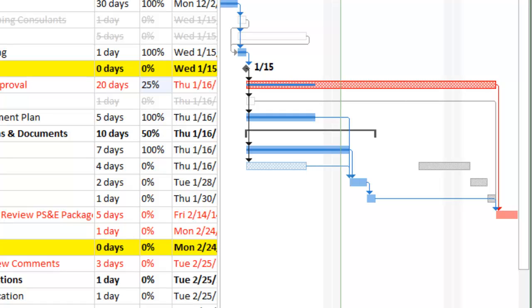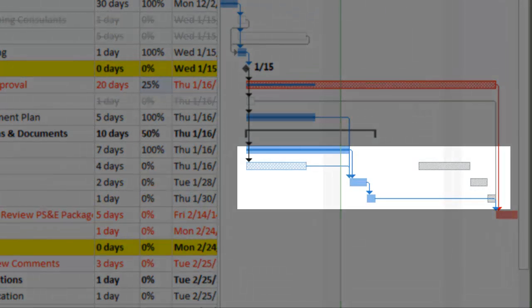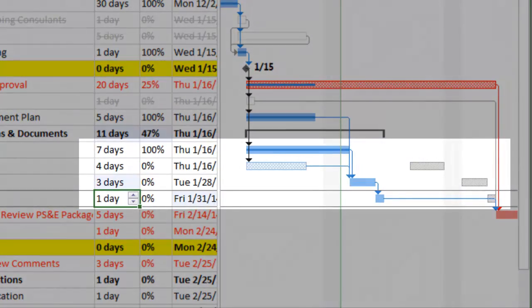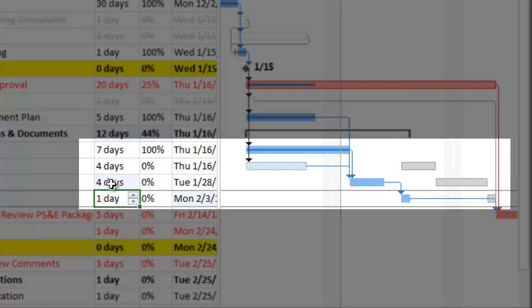It allows the project manager to quickly visualize activity float by displaying the latest a task can be pushed before it becomes a critical task. As the task's float is used, the task will approach its late start, late finish projection.